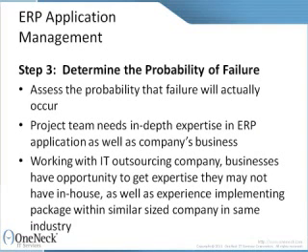Step 3. Determine the probability of failure. The next step involves assessing the probability that the failure will actually occur. Experience is crucial at this stage of ERP application management projects. The project team needs in-depth expertise in the ERP application as well as the company's business. By working with an IT outsourcing company, businesses have an opportunity to get a level of ERP package expertise they may not have in-house. Plus, experience implementing the particular ERP package within a similarly sized company in the same industry.